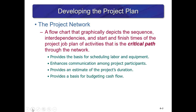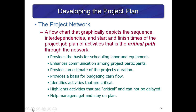Developing a Project Plan starts with the Project Network, which is a flowchart that graphically depicts the sequence, interdependencies, and start and finish times of the project job plan of activities. The critical path through the network provides a basis for scheduling labor and equipment, enhances communication, provides an estimate of the project's duration, provides a basis for budgeting cash flow, identifies activities that are critical, and helps managers get and stay on plan.